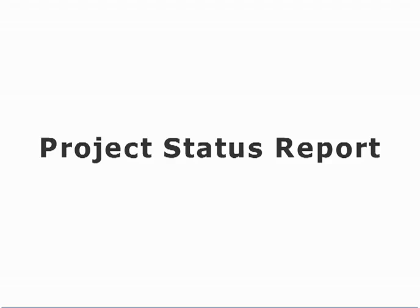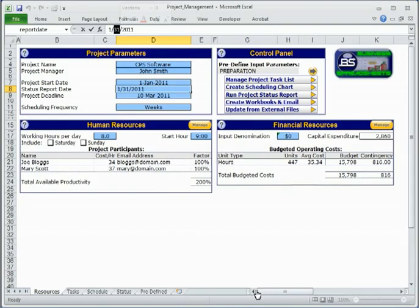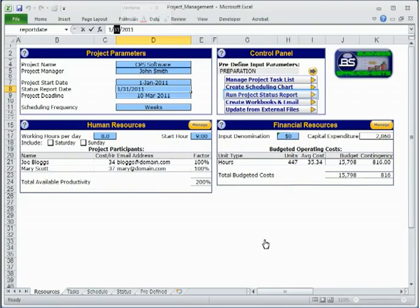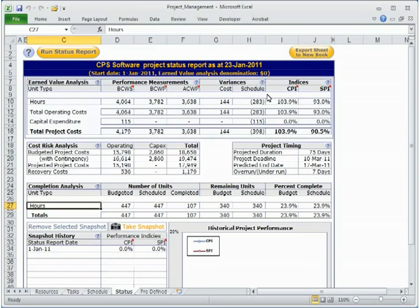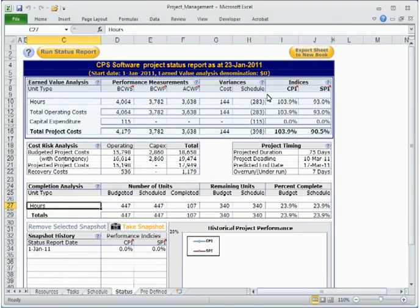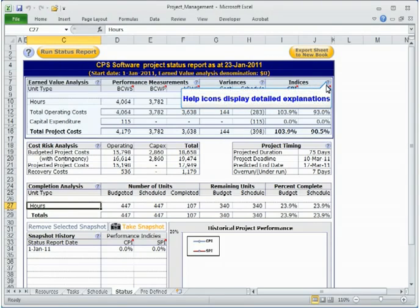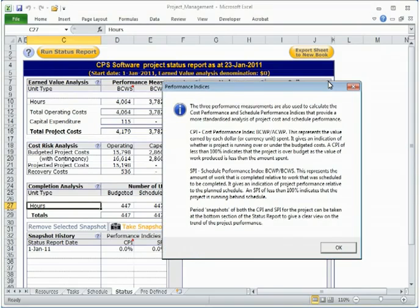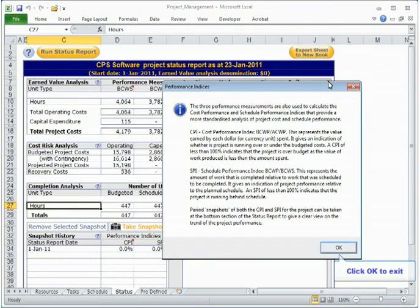Running and analyzing the project status report. The project status report can be run at any time to gain an insight into the current progress status of the project and identify risks in order to take necessary corrective action. Earned value analysis compares the planned resources to the project's time-based schedules and costs to constitute a cost and schedule measurement baseline. Detailed explanations of the measurements are displayed via the help icons.